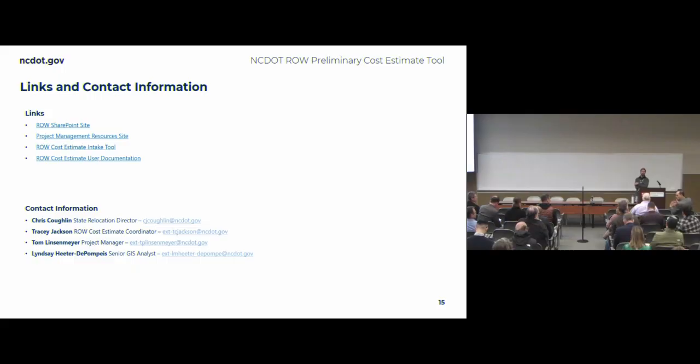We know what it costs to acquire. We know what the renovation costs are. We know what the multipliers are. We have control of that data, so we can put it in the tool, working with time to adjust and make a preliminary estimate pretty accurate and standard cost. Thanks.